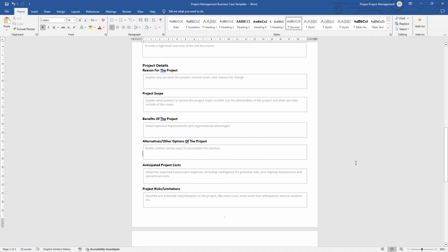Next, we have the anticipated project costs. Anticipated because we don't know the full cost at this stage, so it is an estimated financial investment required for the project. It should also include initial implementation costs and ongoing maintenance expenses as well. So in the context of our CRM, the estimated costs include software licensing fees, consultant fees for implementation and support, and ongoing maintenance expenses. And you can actually put an exact figure in here. As an example, $150,000 or £150,000, or the currency wherever you currently are.